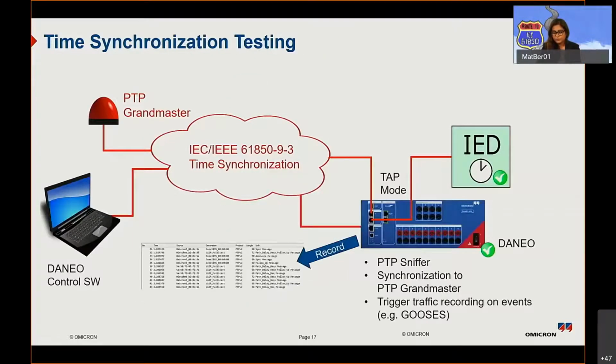So when you are building a digital substation, make sure that a couple of times you create failure scenarios and see how the switchover between clocks or clock classes, or from satellite to oscillator back to satellite, happens. And then your IEDs all stay stable and they perform the way that they are supposed to. And we used NU 400 for this purpose, and it's proven quite successful. And I highly encourage you to do this test.